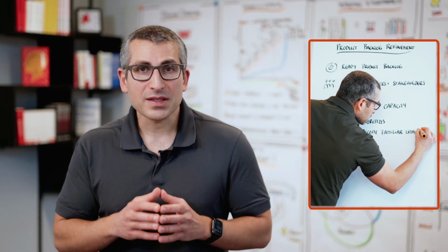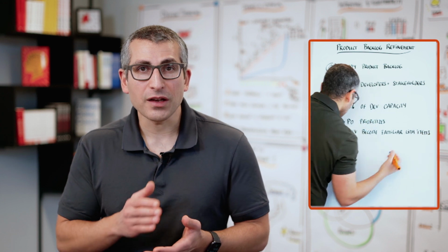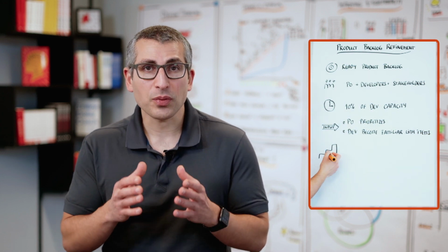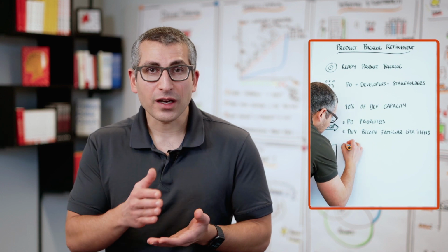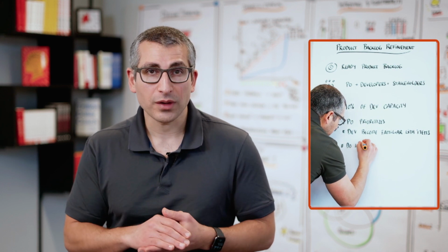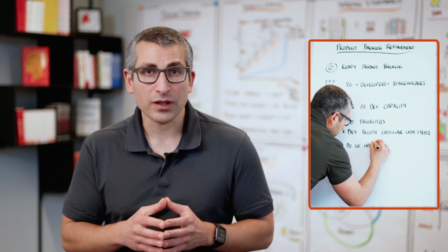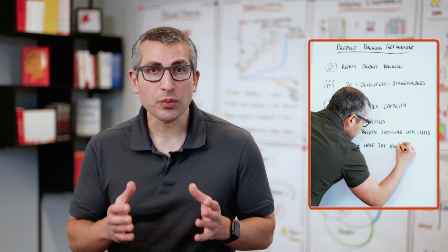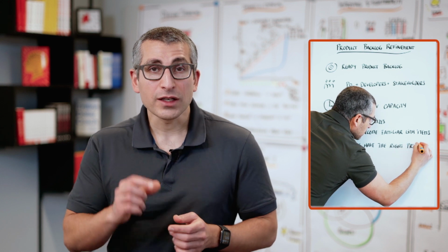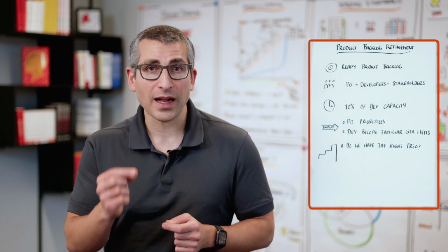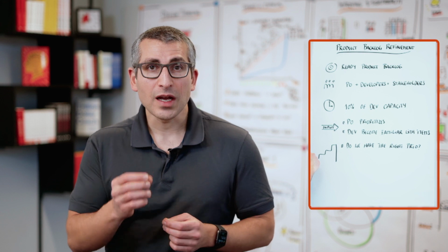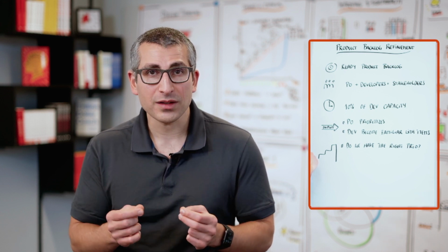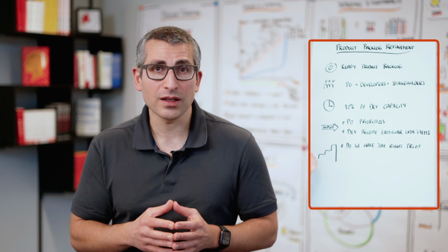The refinement itself is usually conducted in various steps. The first step is to challenge the priority. Does the current order of items work, or are we not accounting for technical dependencies? If not, how can we reprioritize the product backlog so that it makes sense in terms of value delivery towards our customers, but also covering or accounting for all the dependencies that exist between the individual items?